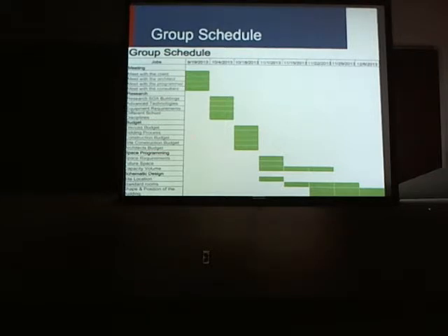So one of the things you might be doing is evaluating whatever you're coming up with, let's say at a conceptual design level, and especially if you modeled it, evaluating it to see if it could be built for the budget. So it's really checking the work as you go along to see if it fits within your budget limitations.